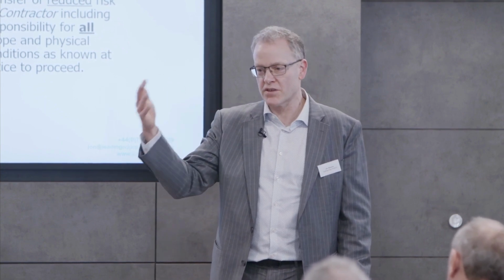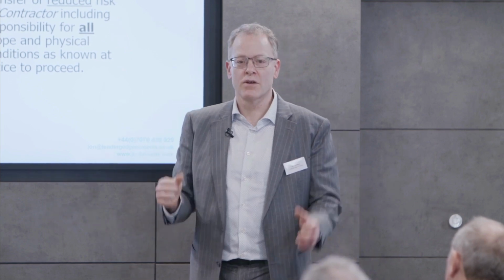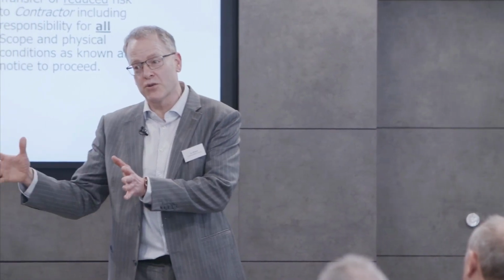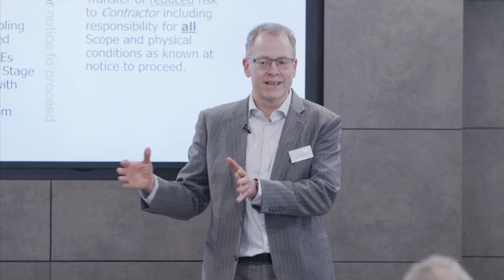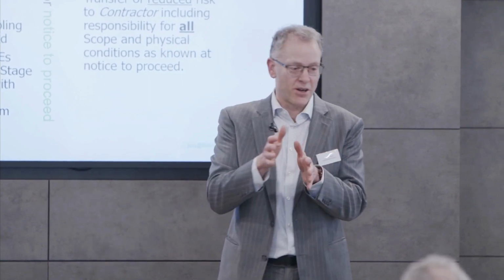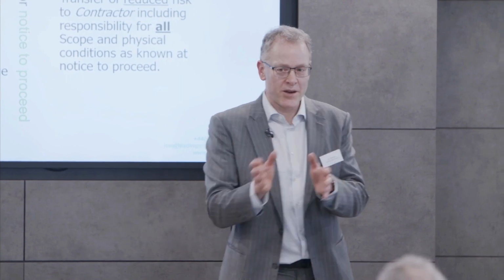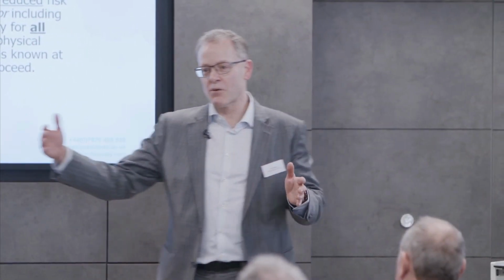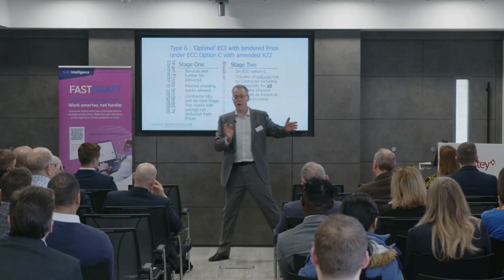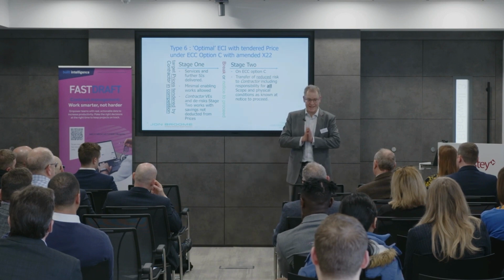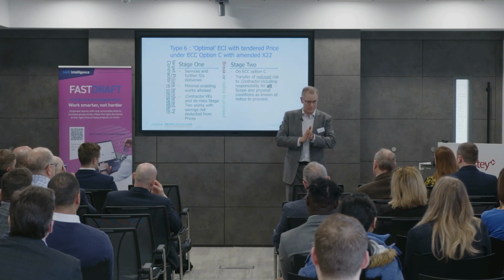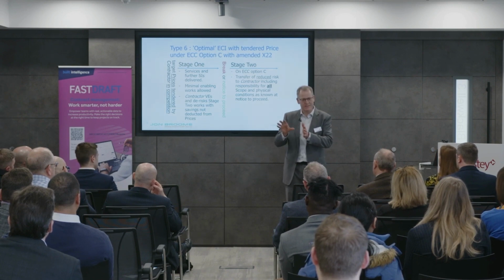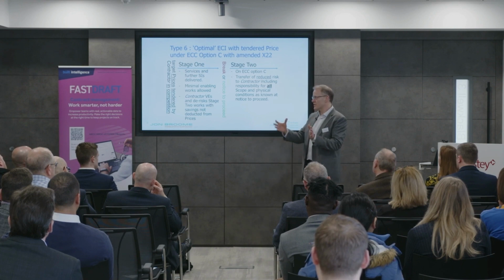Any adjustments that are made, yeah. So if you identify physical conditions in stage 1, which you go, crikey, didn't expect that, those could adjust your tendered prices. But you can't enter into stage 2 and say, well, we didn't expect them. It's from whether you expected them when you submitted going into stage 2. So you'd lose the physical conditions compensation in effect in stage 1 if you didn't enact it.